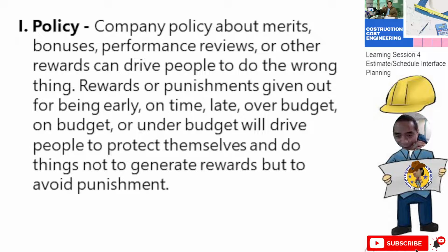Next is policy. Company policy about merits, bonuses, performance reviews, or other rewards can drive people to do the wrong thing. Rewards or punishment given out for being early, on time, late, over budget, on budget, or under budget will drive people to protect themselves and do things not to generate rewards but to avoid a punishment.